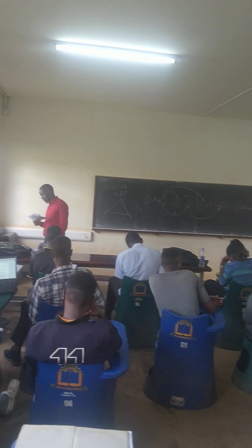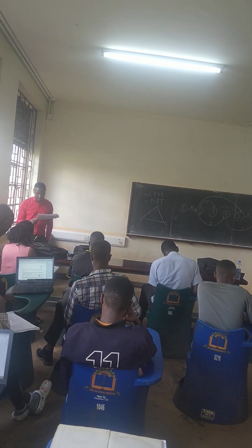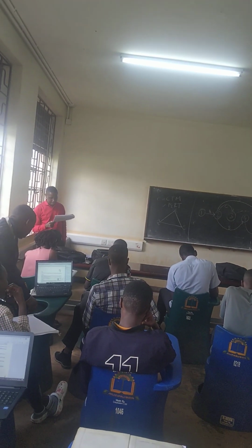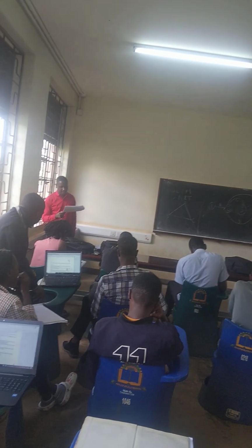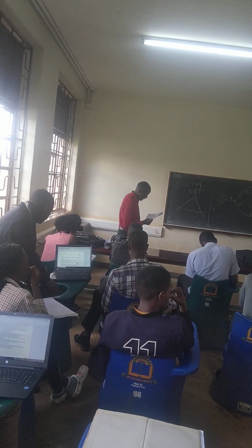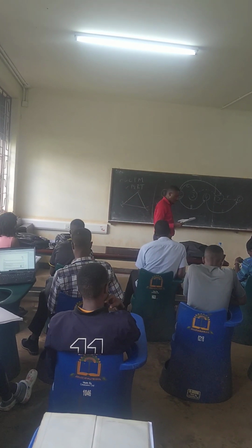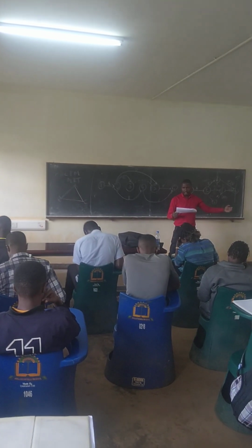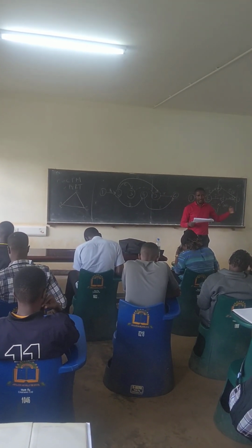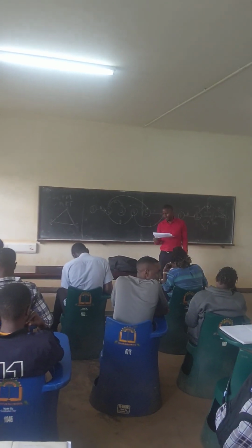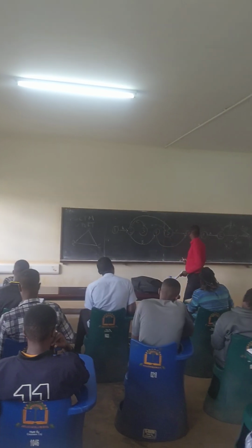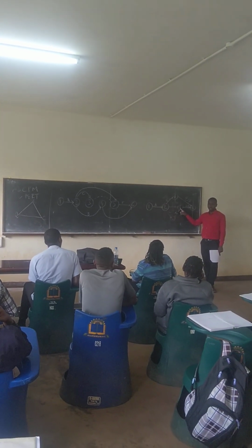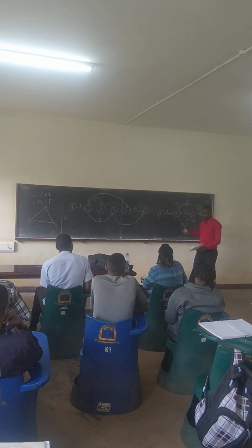And the next is free float. They're telling us that this is the amount of time an activity can be delayed, again, without affecting the commencement of the next activity's EST. You don't want to affect the next activity. Even if you delay this particular activity, it's not becoming a problem for the next one. Are you together? That's what free float is.